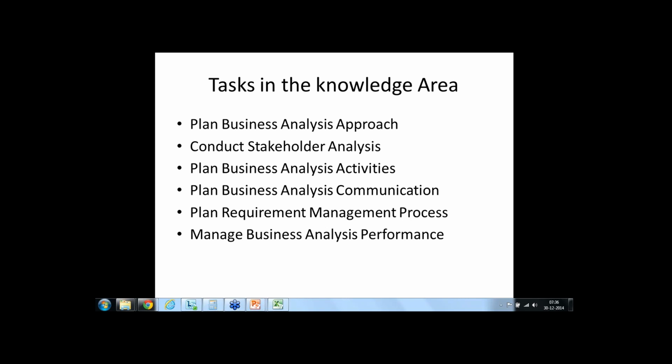When we are talking about dependencies, are we talking about the stakeholders? Yes, it may be the stakeholders. Stakeholders also may be dependencies, or apart from stakeholders, you may have other factors also. Suppose you are developing an IT system, you may have dependencies like your IT system's uptime, downtime, or availability. Say, for example, you want to communicate to that system every second, but that system is available for receiving such communication only once in 10 minutes. So all these are dependencies.